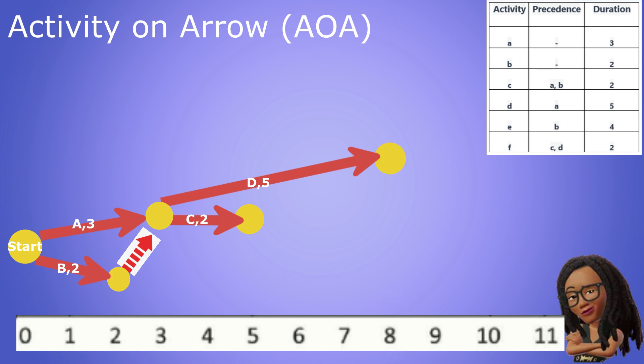Activity E only has B as a predecessor. So we draw an arrow from B's terminating node for a length of four days which means activity E terminates at day six on the timeline.